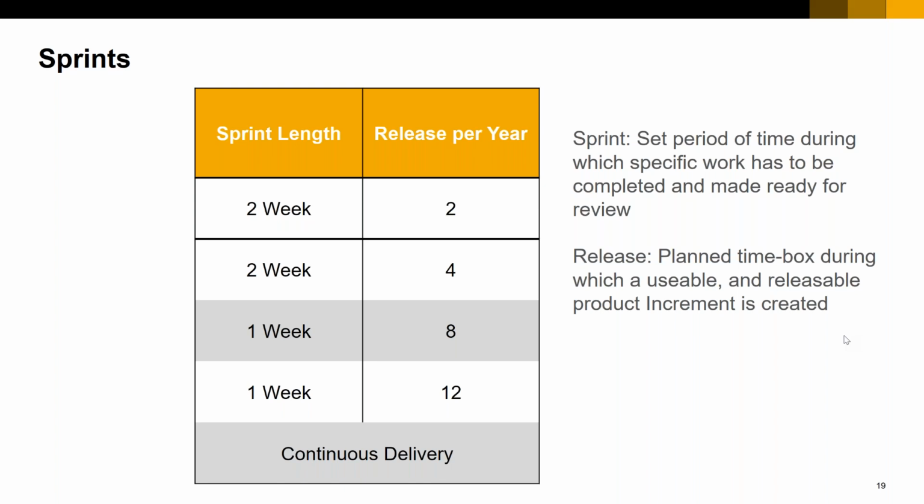In bigger organizations you have to take care of a lot of product standards, quality standards and corporate standards that cannot be mitigated, even if you want to deliver the smallest functionality. So for some of these special cases we can only have 2 releases per year, and for these 2 releases per year, we also tend to go with 2-week sprints, right?